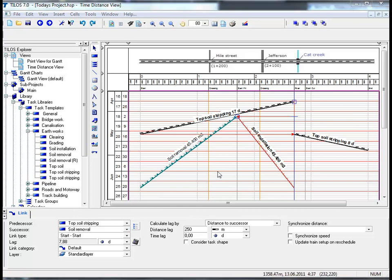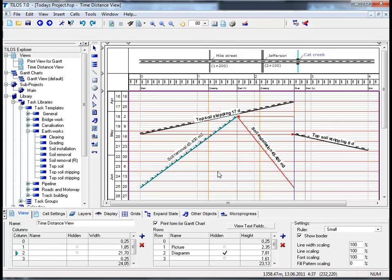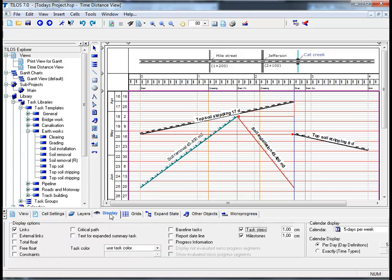This simple exercise shows that there is more to the TILUS algorithm than just linear scheduling. Clicking on the main working area and going to the Details Toolbar, then clicking on the Display View tab and choosing Total Float, Free Float, and Critical Path, we can see that TILUS has adopted the Critical Path Rescheduling Method based on CPM methodology, displayed graphically.